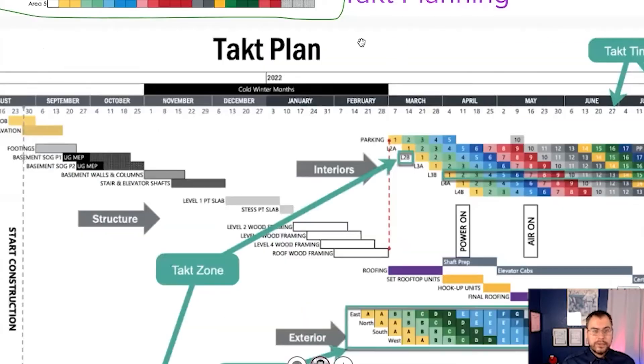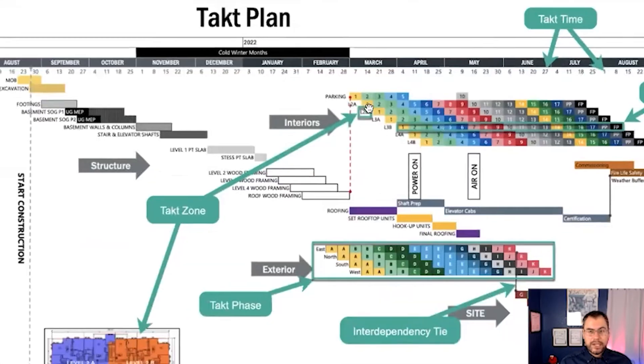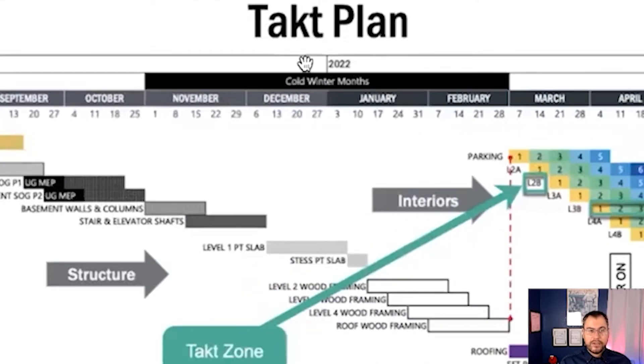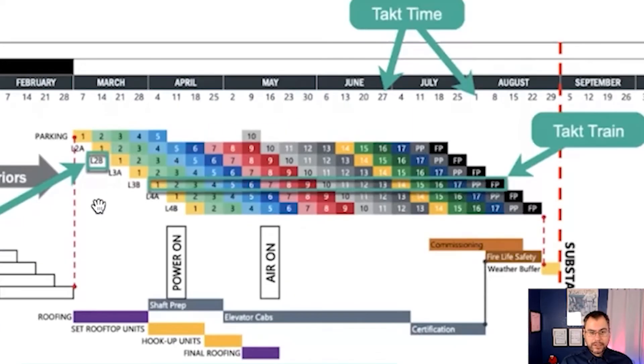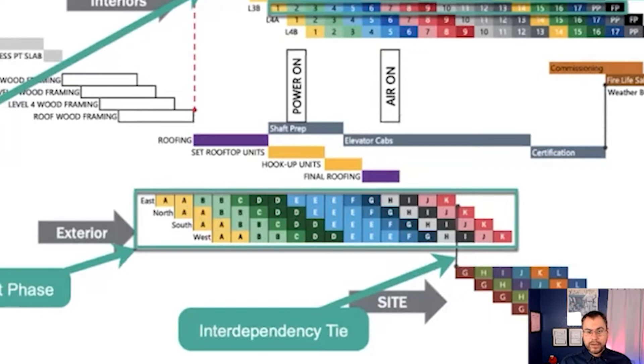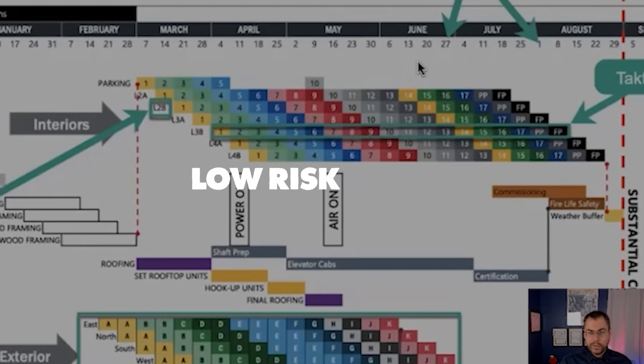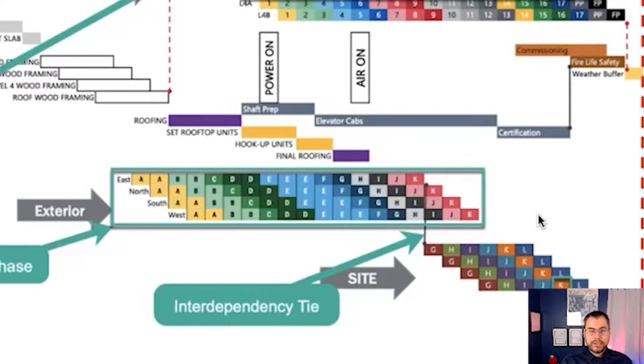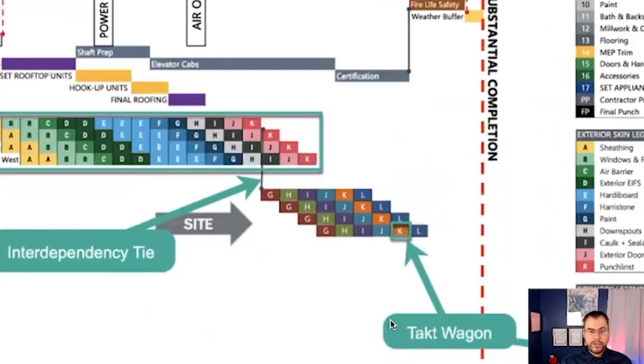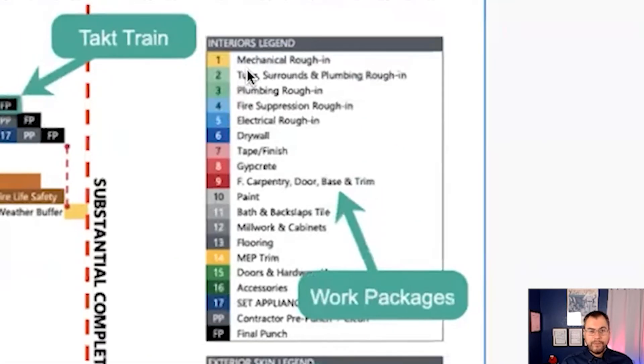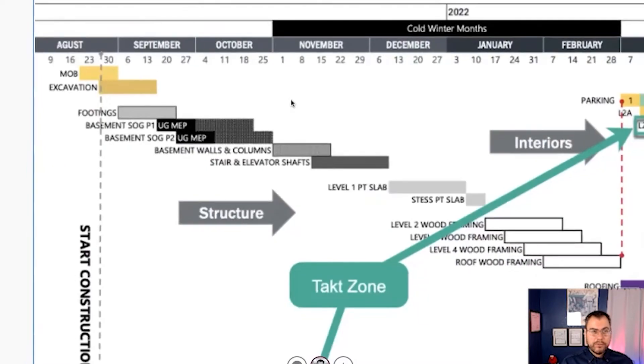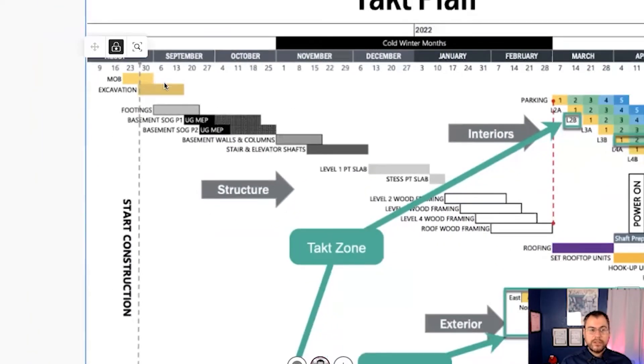This is an example from LeanTACT. They gave a nice key example. This is a one-page schedule that you can see spans about a year and a half. I've got year on the top. I've got my time. I've got my location. I've got the TACT zones called out. We've got an exterior separate TACT tier from the interiors. We have exterior happening, and then we get enclosed, and we start to really go after low-risk interior construction, as well as later picking up the site. Each one of these represents a TACT wagon.